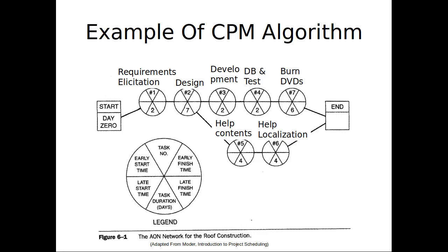That's the critical path there. I'll make it more obvious. It runs like this. That is the path which is frankly most important. It's most important because if we slip up on any one of these nodes, if any one of them is delayed, if the duration is just a bit longer than expected, it will delay the entire project. We have no slack on these. We have no give. We have no float. As indicated by the fact that early start is the same as late start. Early finish is the same as late finish.